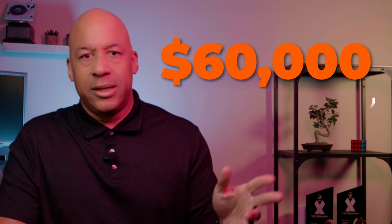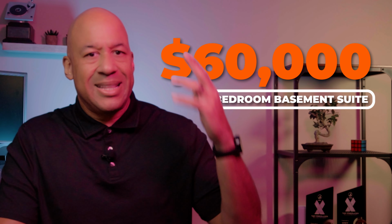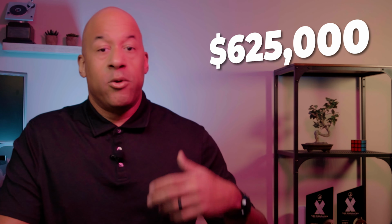Now, what about if we finish the basement suite? Depending on the materials used and the contractors hired, the prices, of course, could range. But again, for the sake of example, let's estimate $60,000 for a legal one-bedroom basement suite in this area. If we assume the purchase again at $625,000, repaired upstairs with an additional $25,000, and added the basement suite for $60,000, now we're at $710,000, with a conservative market estimate between $675,000 to $700,000. We unfortunately run the risk of doing all this work and paying more than market value.